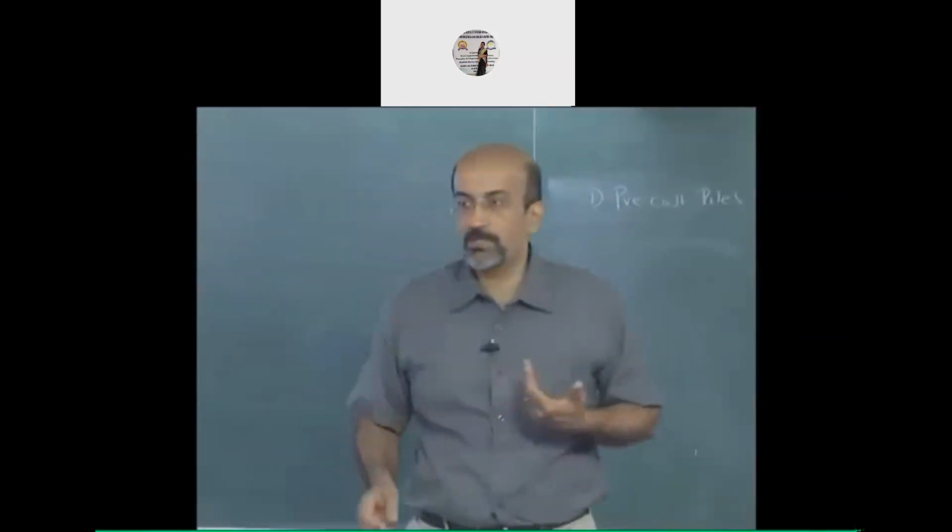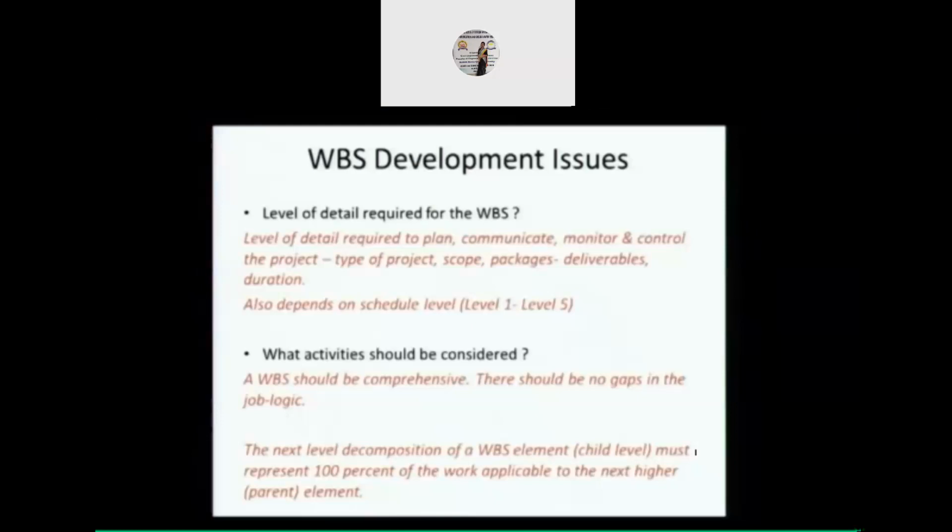Okay, other questions or points? Okay, so here we raise a common question: what is the level of detail required? We would say the level of detail required is what is needed to plan, communicate, monitor and control the project, given the type of project, scope, package, deliverables, and duration. Another very important factor in the level of detail is duration.